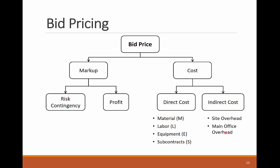The markup is not only limited to profit, but also includes contingency funds to account for unforeseen risky events that can occur during the project. A higher contingency fund is allocated in risky projects with missing information or non-typical work conditions.